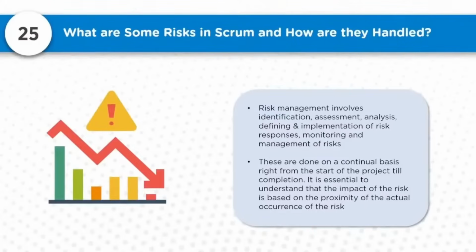Now, risk impacts and probabilities may vary as the project progresses. So we may require to keep assessing the identified risks and keep identifying new risks as we progress in the project. These are done on a continual basis, right from the start of the project till completion. The reason I told this is, it is essential to understand that the impact of the risk is based on the proximity of actual occurrence of the risk.